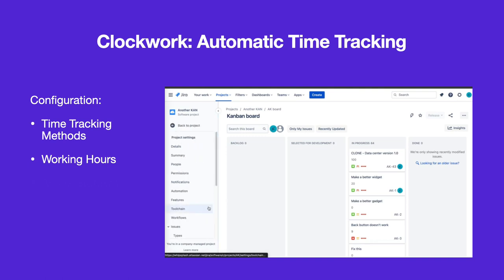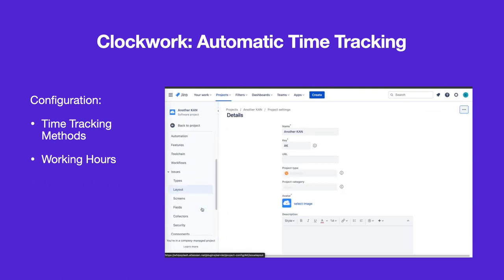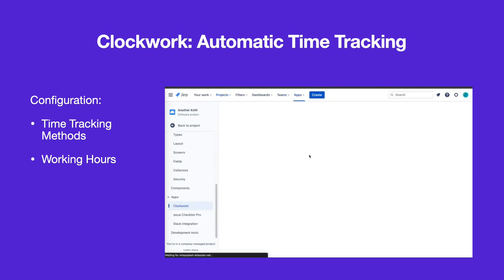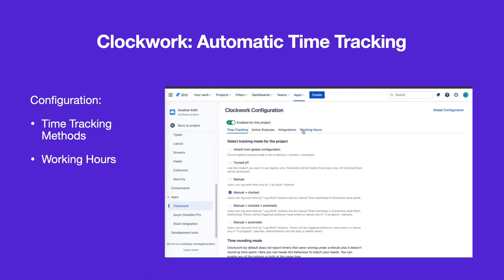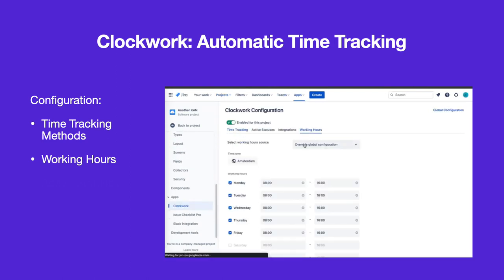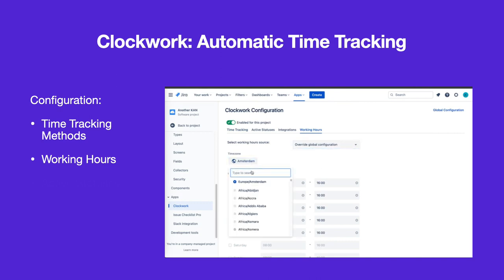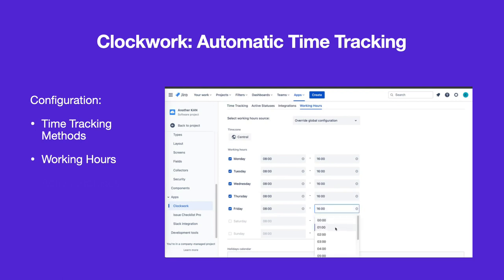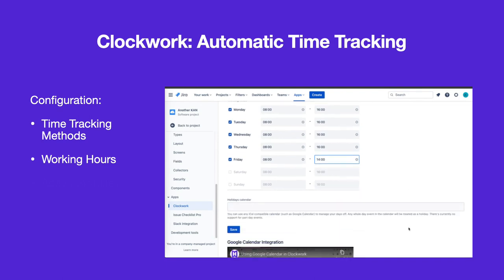To configure working hours for the project, navigate to Project Settings > Apps > Clockwork and select the Working Hours tab. Use the drop-down to indicate that you want to override the globally configured working hours. Select the time zone, input the working hours, and click Save.